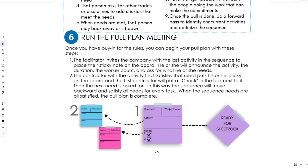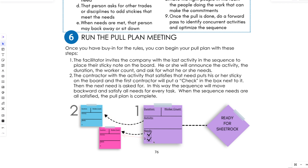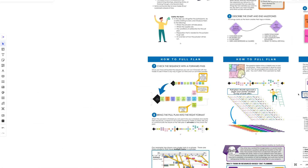Continuing the numbering exercise: number one is the milestone, number two is the last sticky. Once you've entered the activity and needs, those needs must be placed as predecessors on the board ahead of that sticky. You're moving backwards, and you check off items as predecessor stickies are confirmed in sequence — that's how you know what tags need to be added. This ensures a complete sequence.